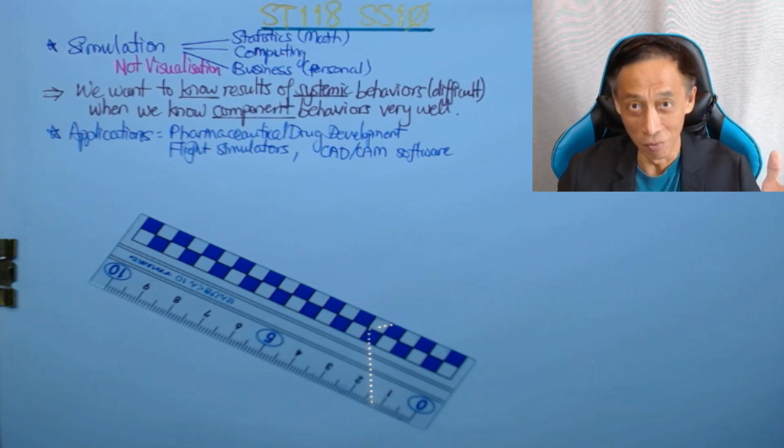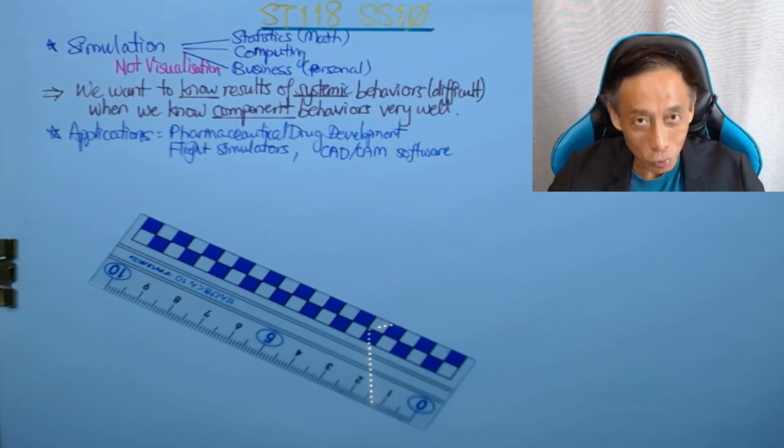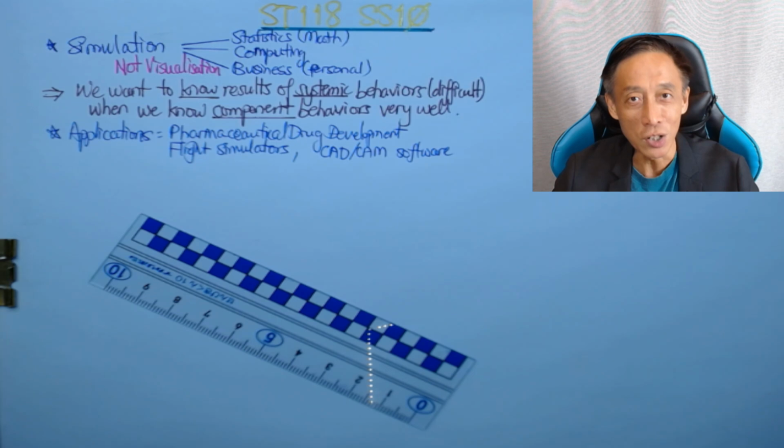1% can be very little for human engineers to look through. And for that 1% of the chance, the finalized circuit layout board, when it goes to manufacturing, can be having problems, short circuited, not connecting properly, whatnot. So there normally will be a prototype. So let's produce 100 first. So at least, when we test it out, it doesn't work, then we can redesign again without having a lot of write-off costs.